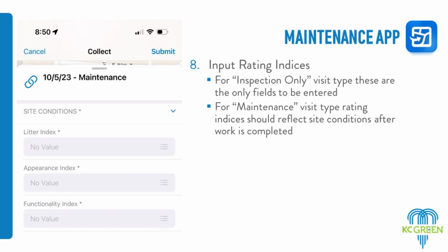Unless there's a problem, a specific issue with one of the beds that you want to document. That's when you can report it to the site level, so that we know. Click on the individual footprint on the map. For your regular routine, we want to see the summary of what you completed for the entire route, that entire project area. But if there's an issue or a specific picture you want to get, you can report that directly to the footprint itself. That's the best way we found to use it, and to clean up the use on the back end.